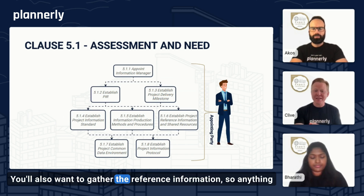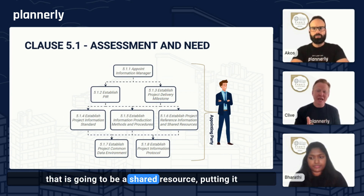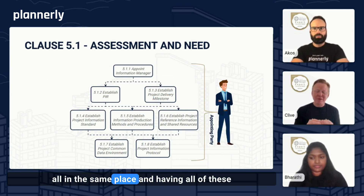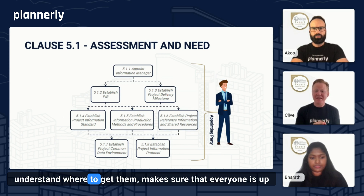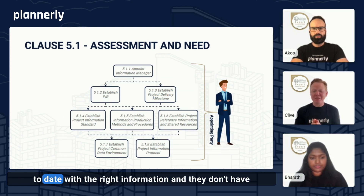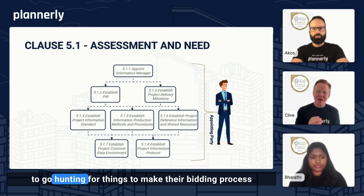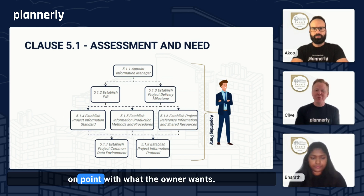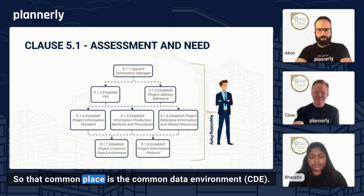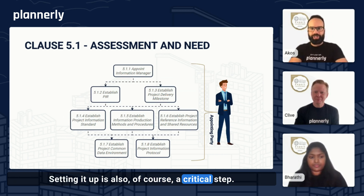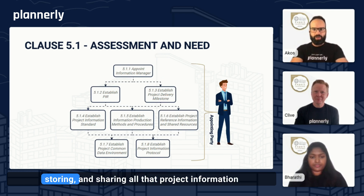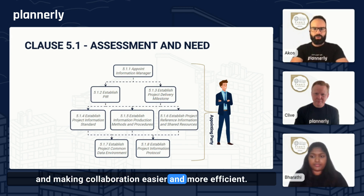You'll also want to gather the reference information — anything that is going to be a shared resource — putting it all in the same place so everyone knows where to get it, making sure everyone is up to date and doesn't have to go hunting for things to make their bidding process clear and on point with what the owner wants. That common place is the common data environment. Setting it up is a critical step — it creates a centralized platform for managing, storing, and sharing all project information, making collaboration easier and more efficient.